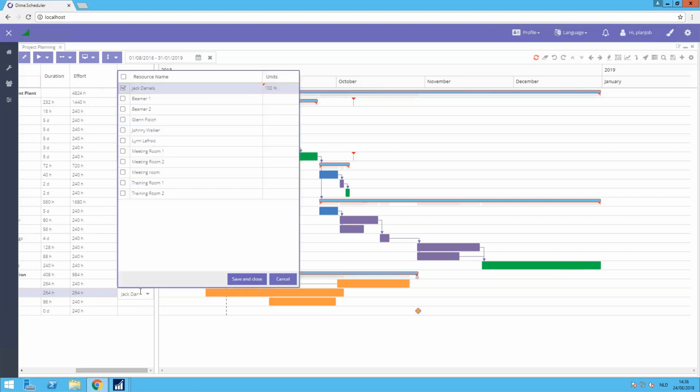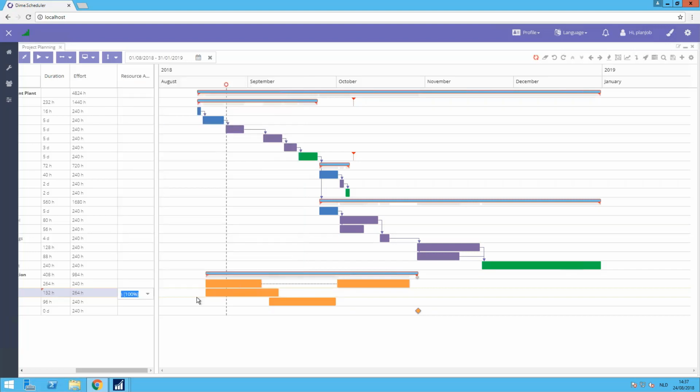You can also do it through the columns. I can add a resource here, Mr. Glenfiddich, to stay in the whiskey theme, and I will save it. You see now that immediately the duration of the task is half of the effort because we added 2 resources to the task, and the task is effort driven. So that's what it means.